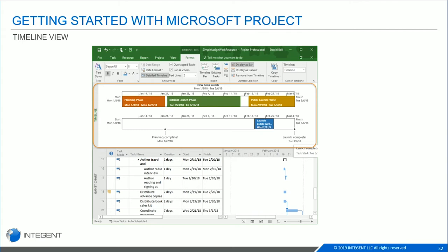There is a copy feature here where you can put it in a presentation, a PowerPoint presentation, an email presentation, some way for you to convey the status of your project with other people. Because you can also pick and choose what you do show here. So you want to show phases, for example, or milestones. You can create a timeline that incorporates that information to share with your stakeholders.